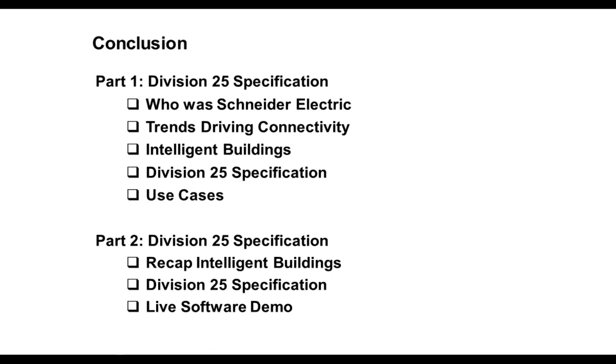When you look at the contracting model and the AIA specifications, the intent was that it would go through an independent body, like a general contractor or construction manager, independent of the mechanical, the electrician, and your security, so that you can get all this data and actually use it in an integrated format.